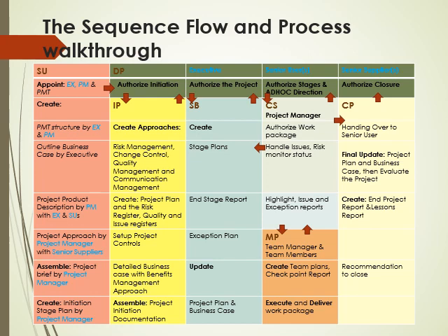Remember, the starting of the project process is to establish viability, achievability, and project being worthwhile. That's what the project brief actually does, is to help us find a basis for initiating the project. But before this project brief document is passed to the project board, the project manager has to create a plan of how initiation, the establishment of the baselines, will be done. So he creates the document called the initiation stage plan.